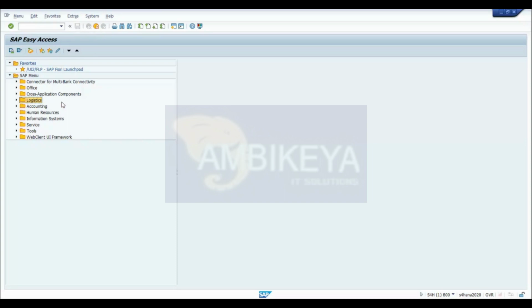So from the starting point of view, we'll start with the project coding mask. The first part is the project coding mask. So why do you use a coding mask? Coding mask is nothing but the identification number of the project. It is used for sequencing and dividing the project structure. So creating the project structure, coding mask plays a very important role. As I explained in earlier classes, with the help of the coding mask, we can assign the identification number to the WBS elements and to the sub WBS elements.